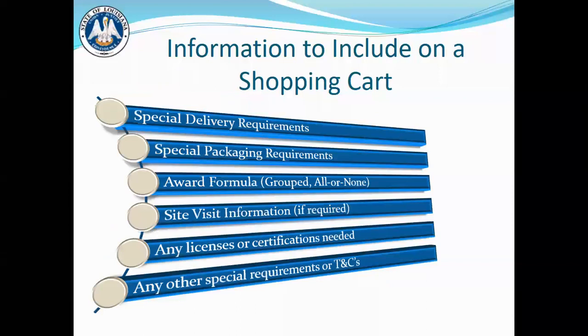You also want to include special delivery requirements, kind of what I touched on earlier, about making sure there's a forklift if you need to unload, or a loading dock, or what floor you are on. Special packaging requirements, if they have to come in a clear wrapper or whatnot. Award formula: is it a grouped or all or none award? Site visit information: is it a mandatory job site visit or a non-mandatory job site visit? Any licenses or certifications needed to complete the job, and any other special requirements on the terms and conditions.